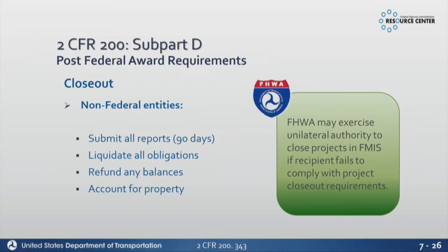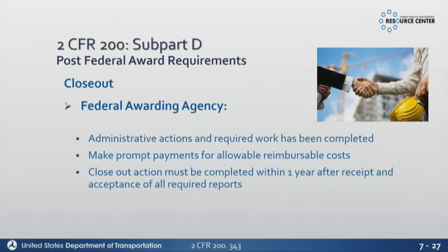We'll give you up to probably a year, because you'll see here in the next slide that we have 1 year to close a project once you guys have submitted it to us. And we can turn around a project closeout in 24 to 48 hours usually. Final vouchers might take us a little bit longer. I'm not sure. Chandler, how long does it take for you guys to process a final voucher once it comes across your desk? Yeah, so a couple days, maybe a week.